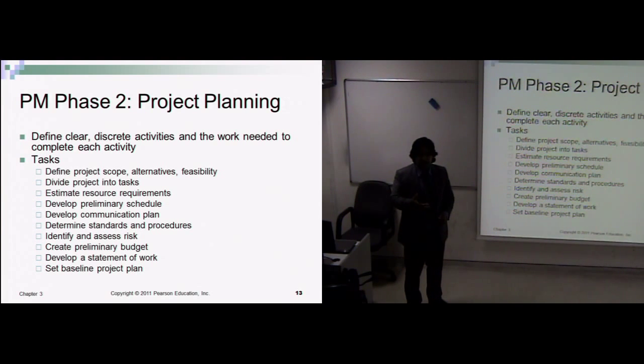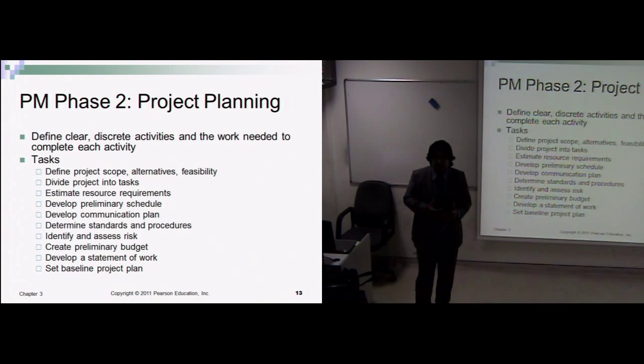Feasibility, determining feasibility of something, means whether it is really appropriate or suitable for us to work on it or not, keeping in mind the constraints. For example, the customer says, I need the project to be delivered within 6 months. This means time is very limited. So as a development team or as a project manager, I will try to assess if it is really feasible for me to deliver this project within the 6 months period of time or not.